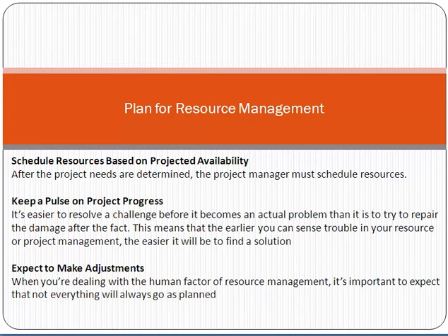Then schedule the resources. Schedule means, friend, basically you are assigning the dates, because you know which resource will be available on which dates. Based on that, and on which dates you have to deliver which deliverable to the customer as well. So you have to make a schedule of resources. You must know that in January how many resources will be available and how many deliverables we have to provide to the customer. So you have to schedule the resources accordingly.